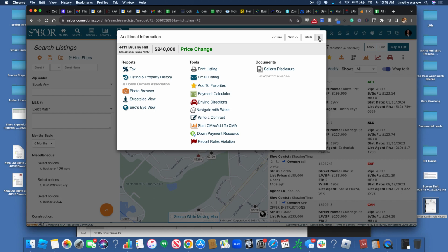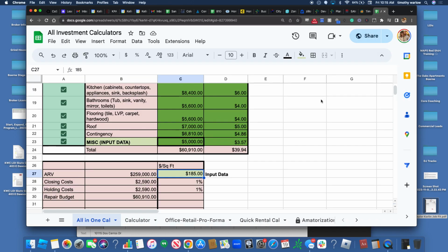Awesome. So yes, if I can do it, that's always my go-to. Does that delay things? How long does it take to get permits? If you're in the city limits, you can add about 2 to 3 months for permitting, and you need to add about $5,000 for architectural reviews.